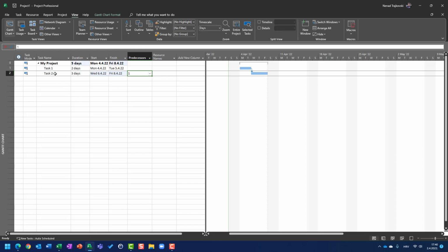And let's say task 2 is supposed to be finished no later than, let's say, April 15, or it must be finished on April 15. If it should be finished on the 15th, I can put predecessors here, like one start to start, plus let's say 7 days, and finish to start, and let's say 5 days, and I will get what I want. But that is not the case here.